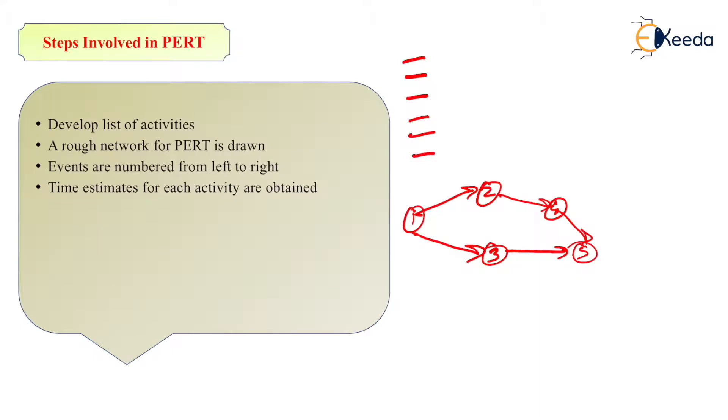After numbering from left to right, next is time estimate for each activity are obtained. Now time estimate. As we know what is TE? The formula is what? We have seen in previous slide, which is TO plus 4 times TM plus TP upon 6. So we have to find out time estimate for each activity. Then you have to find out expected time for each activity by using this equation. Your time estimate will be found out by using the scheduled network. The total time required, we have to find out.